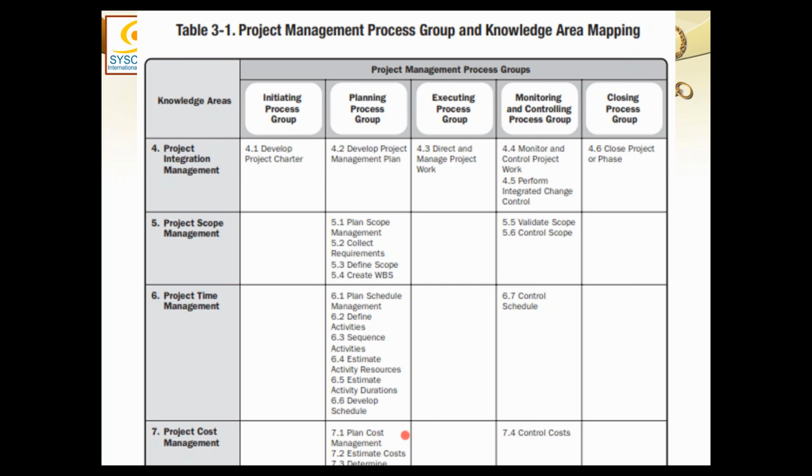So the three project objectives, scope, time, and cost, will have to be baselined, and these baselines must form part of the project management plan. That project management plan, when executed, will automatically be an integrated execution which would contain everything included in the detailed plan of scope, schedule, and cost. That is exactly one of the reasons why we do not have scope, time, and cost in execution. Am I clear about that?